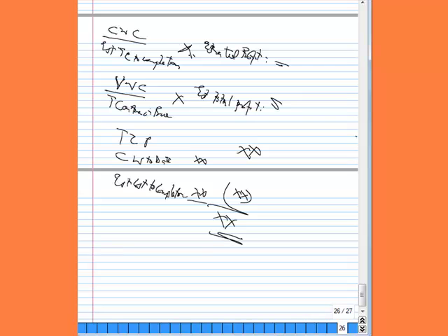The completed contract method, in its own case, is used for short-term contracts as well as long-term contracts in which the profit cannot be estimated on the whole contract. In that case, no profit is recognized in the financial statement and everything is deferred until the contract is completed. But in both of the methods, where it is emphasized that the contract will bring about a loss, it should be provided for immediately in full, irrespective of the stage of completion of that contract.